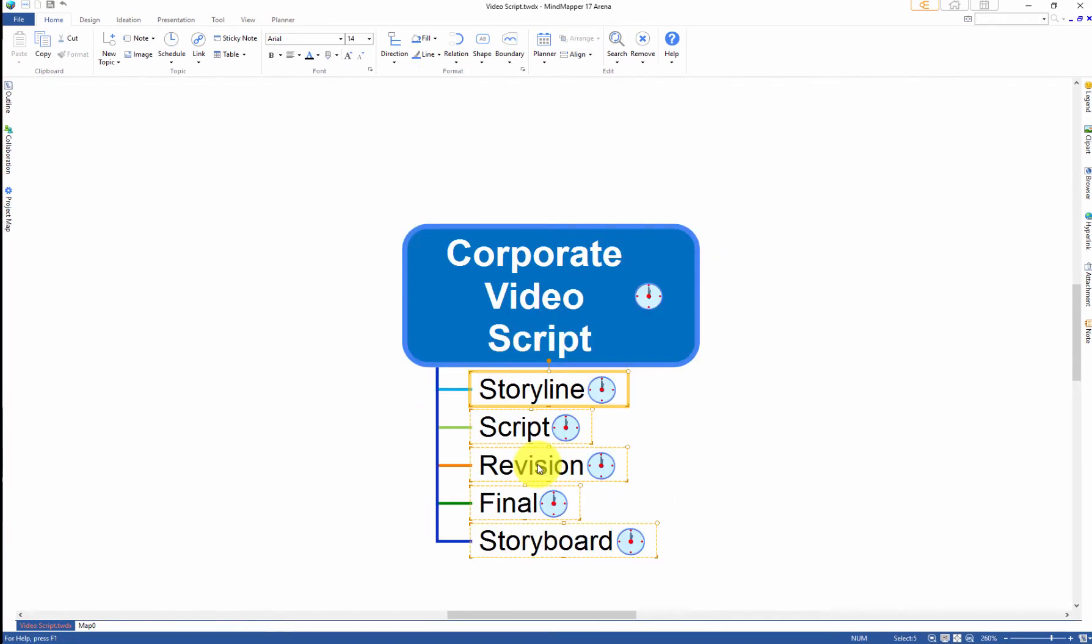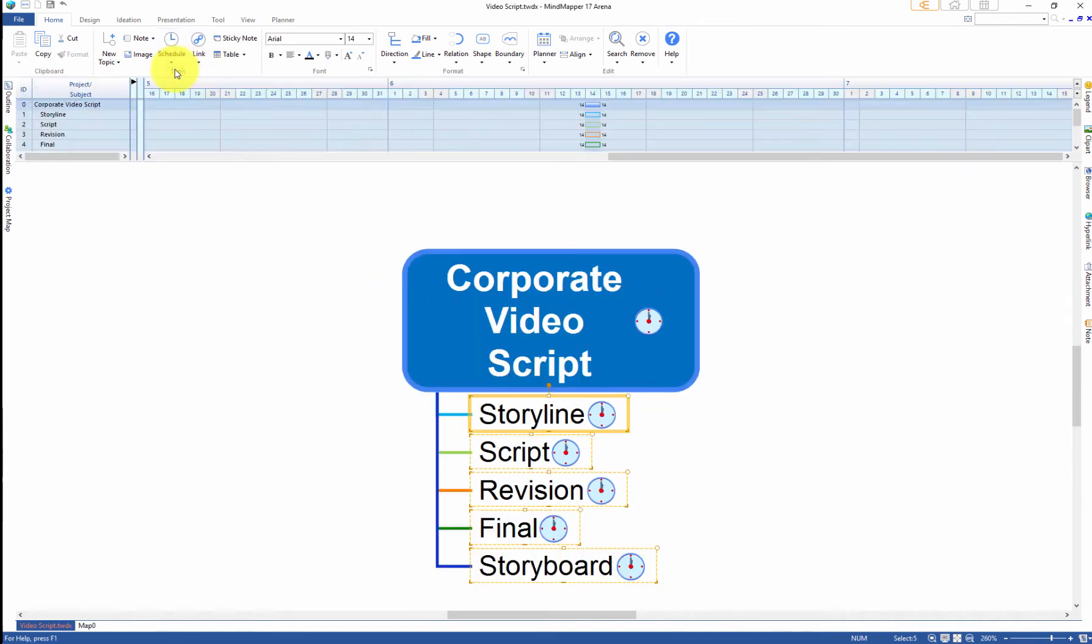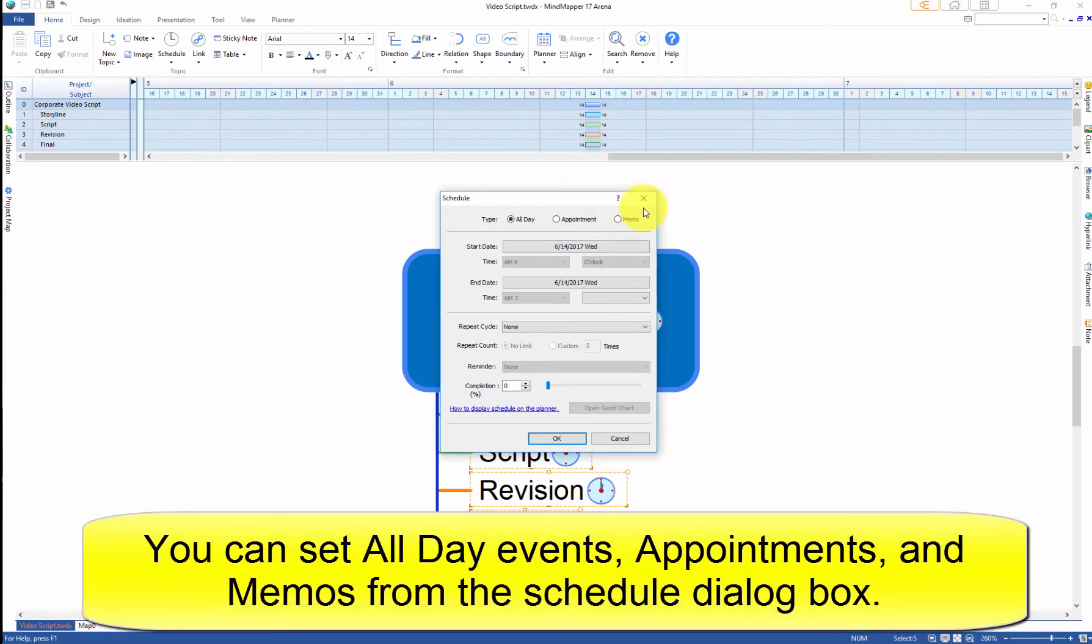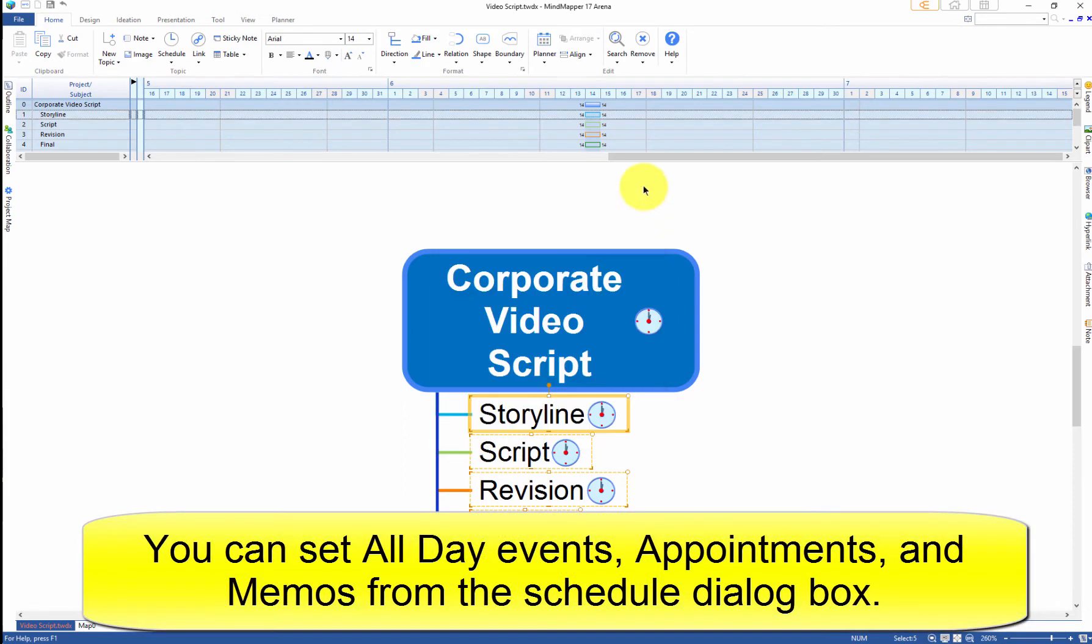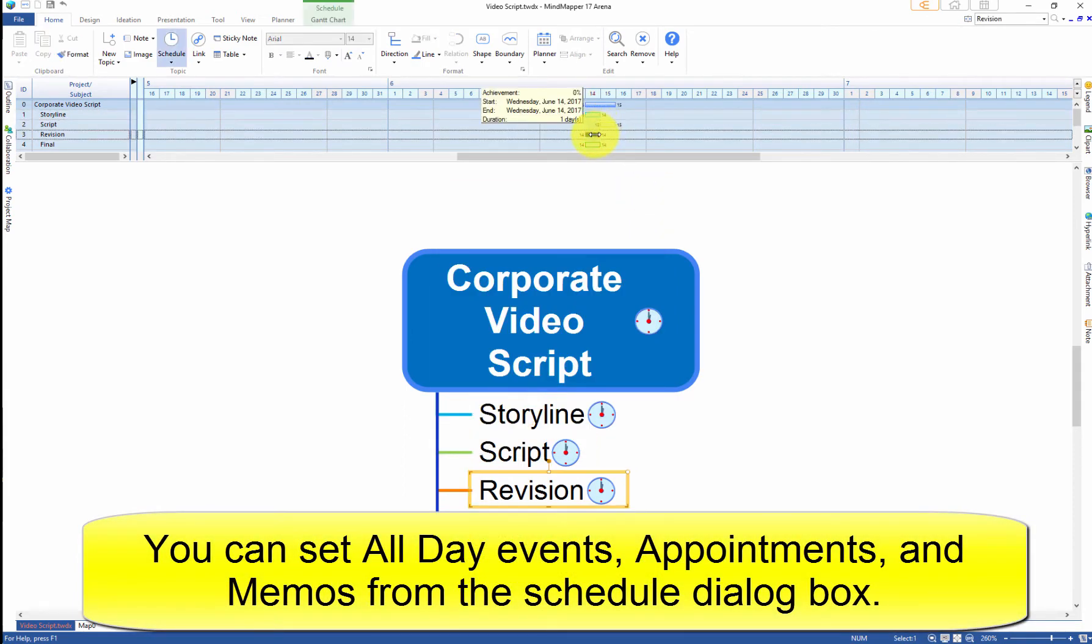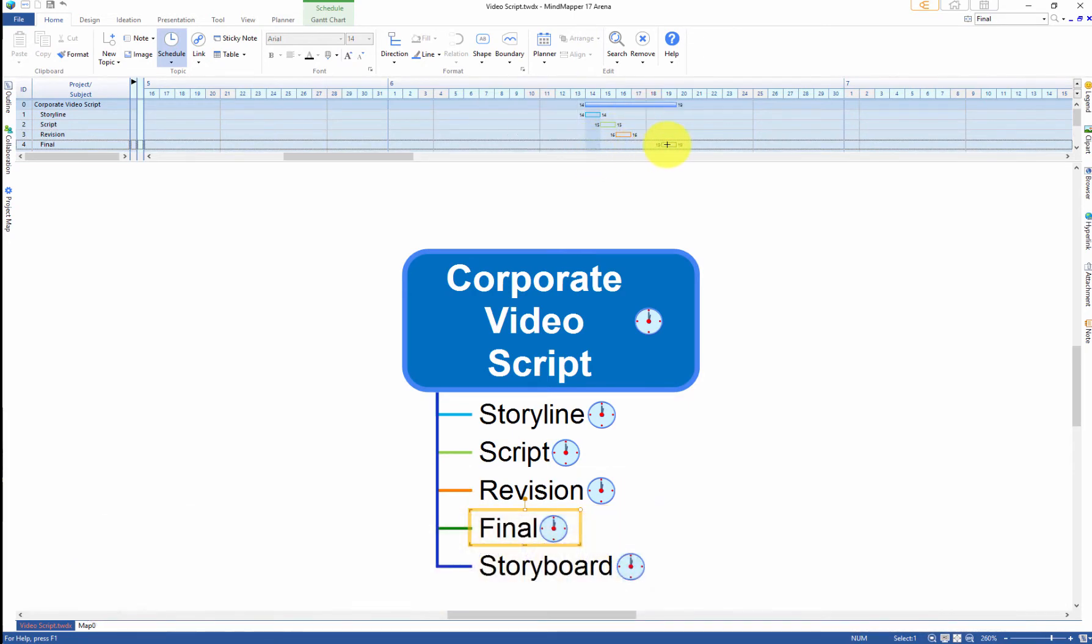Add schedule using the Ghent chart or the schedule dialog box. In this video, we are going to use the Ghent chart for convenience. Simply drag the bars to assign range of dates.